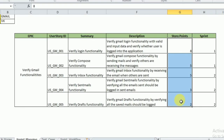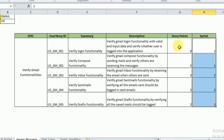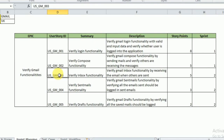In real time, the planning poker method is used. Everybody discusses in the sprint planning meeting how many story points for each and every story — everybody listens to the complexity of the user story and how many story points it will take. Based on that, we average it and the scrum master and entire team assign story points to each story. They also finalize which user stories to pick up for the current sprint and which for the next sprint.